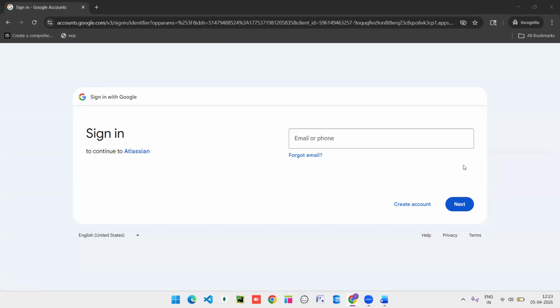After completion of the sprint, can we deliver to the client? No, in a single sprint we are not delivering to the client, but we need to show the UAT process, where we conduct UAT to check that all the features are successfully met as per their requirements. After completion of all the sprints, 5 sprints for all 20 user stories, and after getting the UAT and approval process, we will hand over this project to the client.